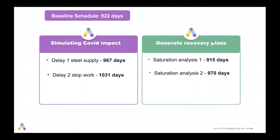We leveraged ALICE's saturation analysis tool to actually identify that we could recover the schedule with additional resources. So ALICE ran these quick simulations and identified that by adding more critical crews at the right time, they could get the schedule to 915 days. But then they got hit with delay number two, 1,031 days due to the stoppage of work, completely shutting down the site. Now we were able to model this impact in ALICE and show the stoppage of work and the delay of steel. But then we ran another saturation analysis, flooding the project with resources. And even with ALICE adding as many resources as was optimally possible and efficient, we found that we were at 970 days.